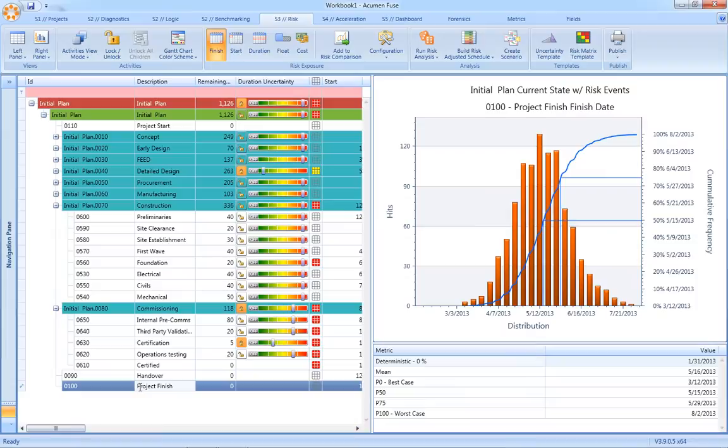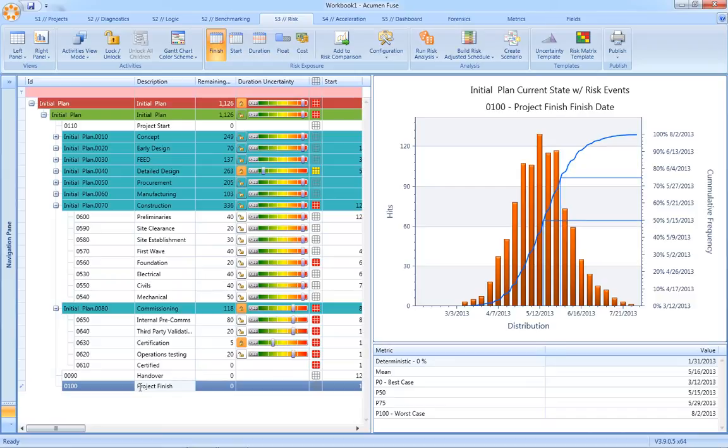From a reporting perspective, Acumen Risk contains three key risk reports, the first being the risk histogram. This is really the what report. It is what is our risk exposure. From this, we can read off confidence levels against the schedule.